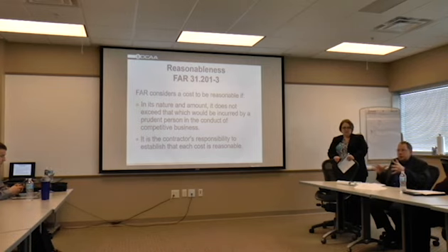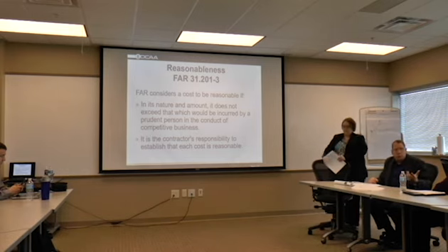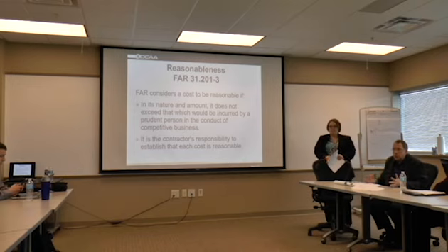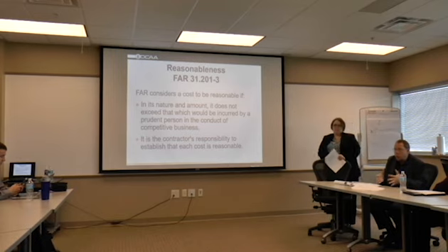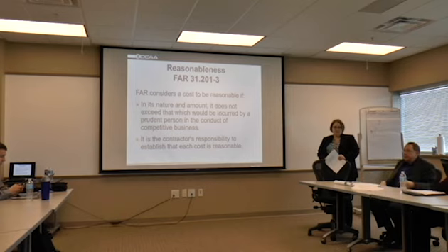It depends upon the nuance of the contract. I have not seen a contract where you as a contractor would be manufacturing widgets that there would be a clause that says no escalation. I wouldn't see that in a solicitation. But if I saw a contract based upon Department of Labor wage determination, yes, I'll see them cap it, because there's an understanding in that type of contract that certain things are going to happen through the life of the contract.